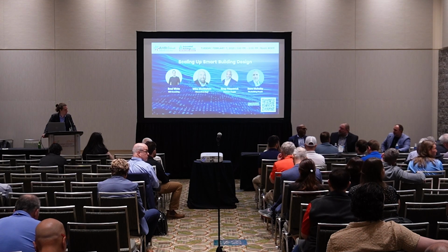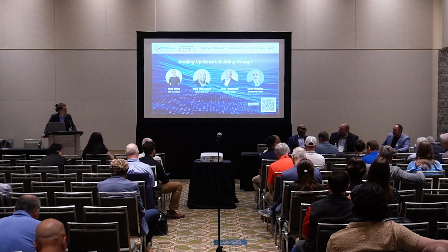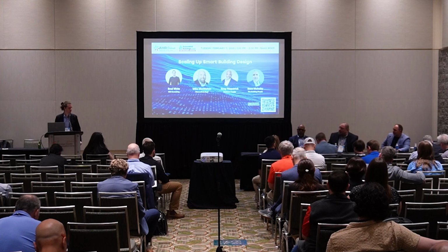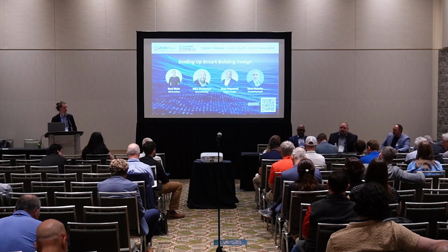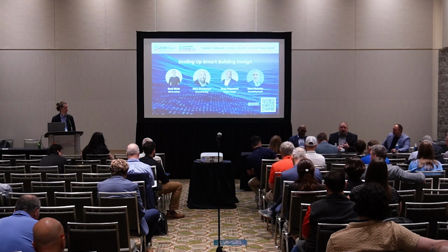We actually have a Division 2520 specification sheet on how to engage the owner's IT. Yep, I love it. Specifically just to help people out, to say, okay, this is how you have the conversation, this is who you contact. You're going to conduct workshops. You're going to do discovery and find out, how do I get IP addresses? What do I have to do?